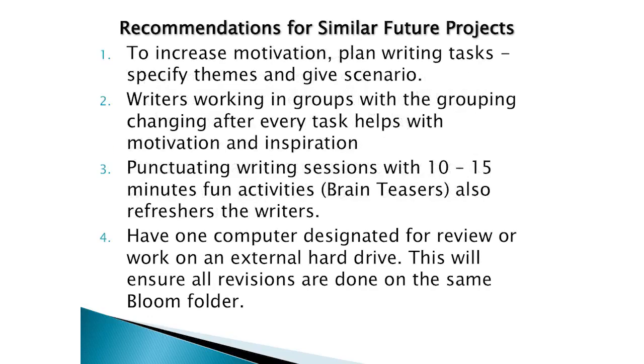So our recommendation for similar future projects is to find ways of increasing motivation. And what has worked for us is planning the writing tasks. Having these writing task sheets turned out to be really, really useful, and then specifying themes, and giving them the scenario that you want to be developed in the story. So there was a lot of discussion. Once a task sheet is given to the writers, what we did was to talk about the theme, talk about possible scenarios. So all these things helped in increasing motivation.